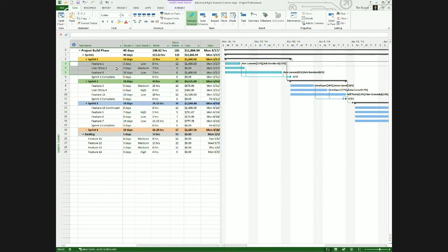Yeah, I just don't encourage people to put people at a summary task level because, one, you just can't get your actuals in there. People can't timesheet against it. So I encourage not to do that. So honestly, I am not aware of anything that broke there because we just don't do it and we don't let our customers do that from a high level. Of course, Project does let you do it, so I wouldn't be surprised. I just don't find that a very good practice.